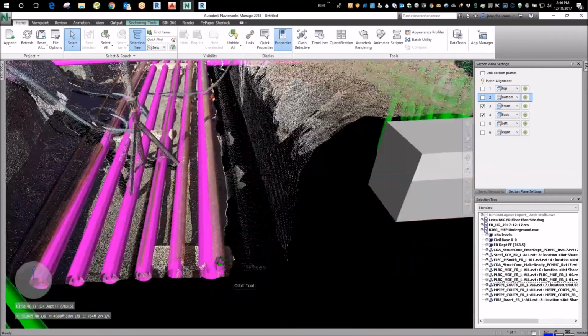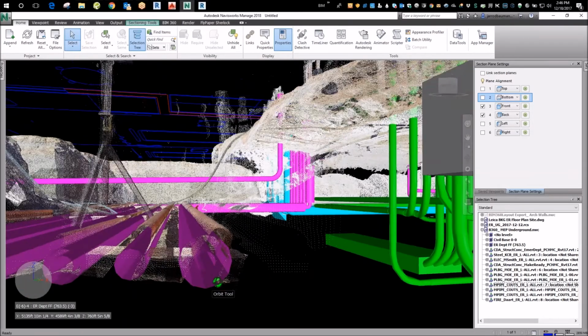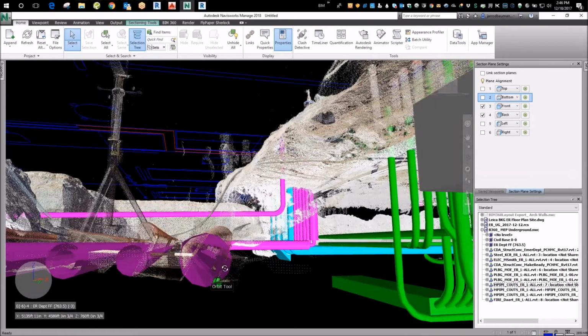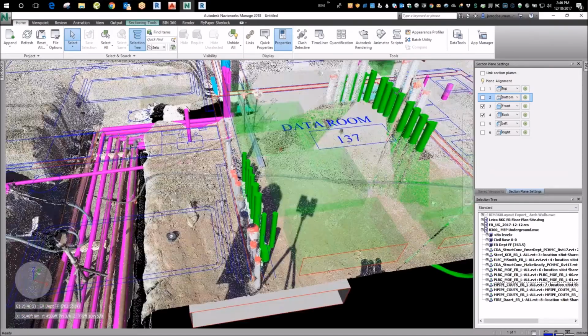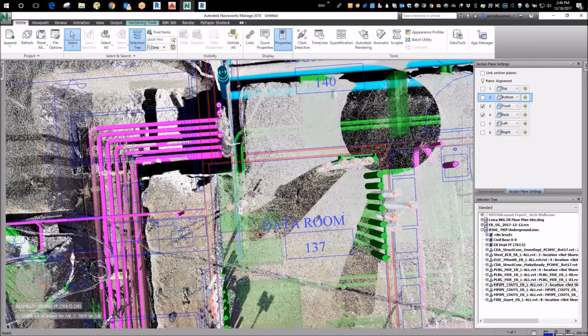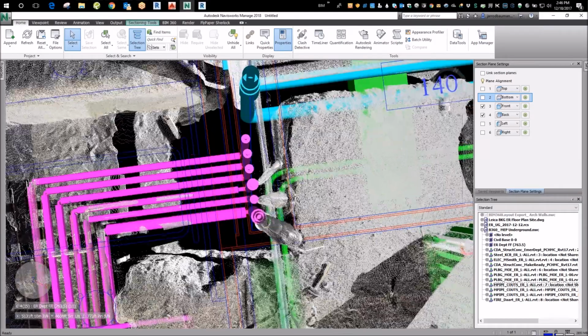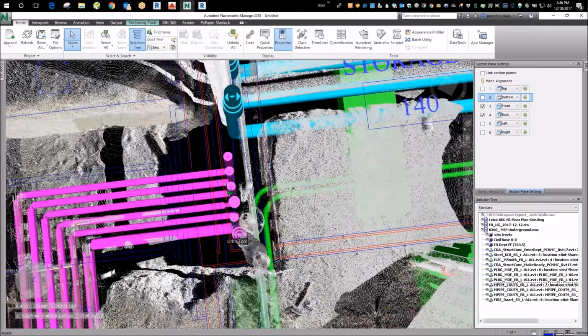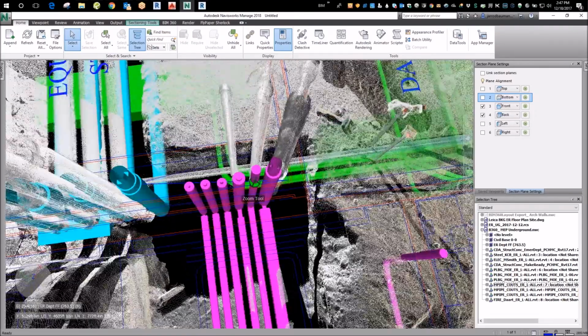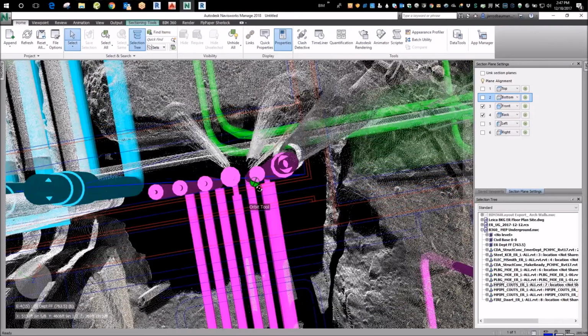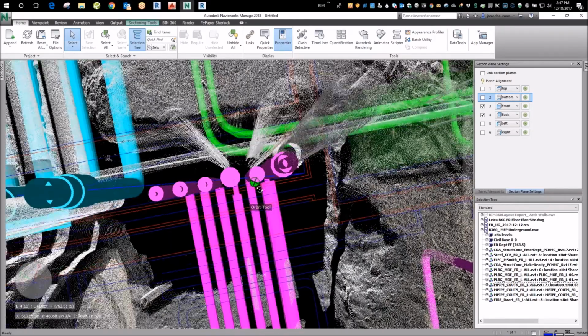Okay. So now, not only can we tell them, hey, you guys missed, or we could even tell Mo, but check this out. I mean, look at Mo's layout. They aren't slurried in or anything. They're just laying on 2x4s. But you can really start to QC all of this and say, hey, your BIM shows these in quite a bit different spot, or your spacing is quite a bit different. Maybe they, for good reason, have them there, but I know Mo is in the chase, but you can see how much the positioning is off.